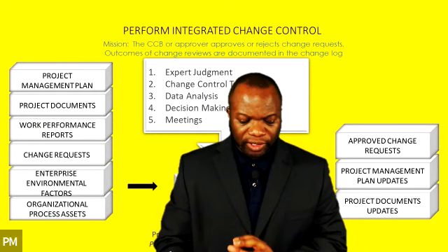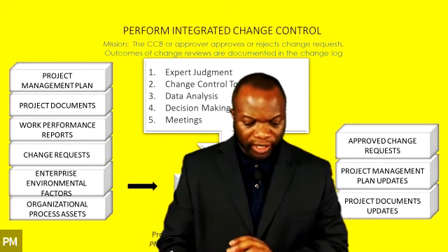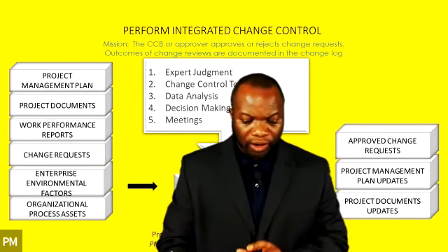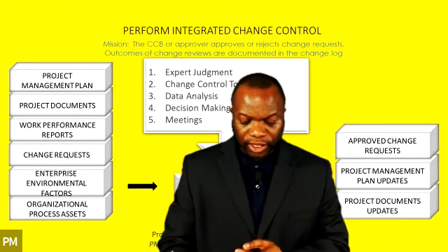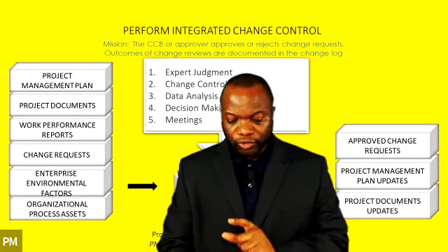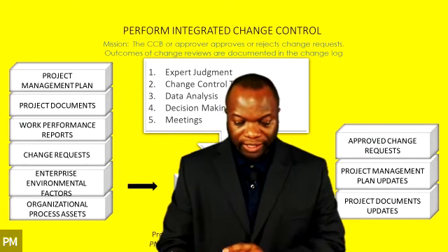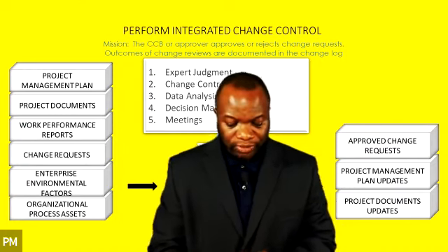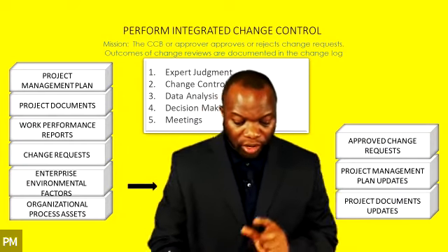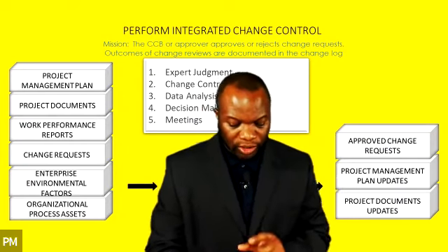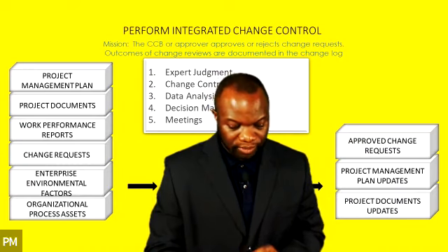Now, this one in the third paragraph on page 115, I want you to highlight it. Although changes may be initiated verbally, they should be recorded in written form and entered into the change management and or configuration management system.